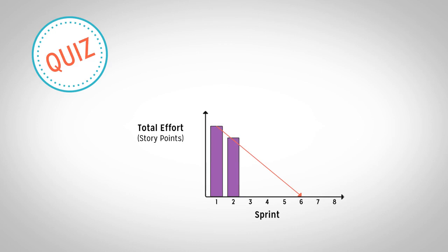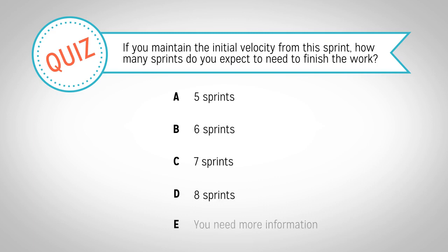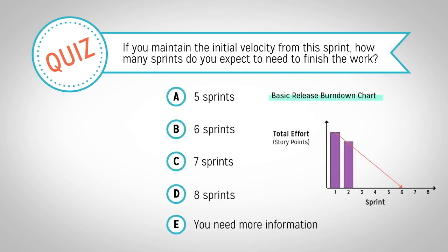Consider this release burndown chart. You have completed your first sprint. If you maintain the initial velocity from this sprint, how many sprints do you expect to need to finish the work? A: 5 sprints. B: 6 sprints. C: 7 sprints. D: 8 sprints. Or E: you need more information. If you maintain this velocity, your prediction line indicates that you will have no story points to complete at the beginning of sprint 6, meaning you will have completed the project in 5 sprints. Therefore, A is the correct answer.